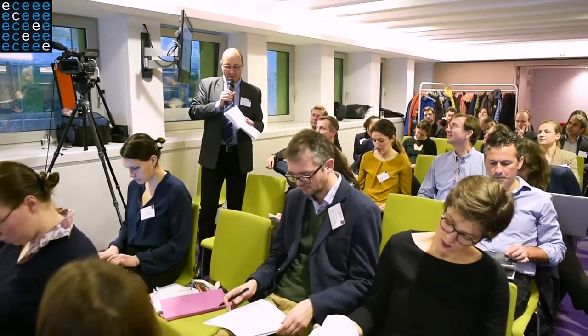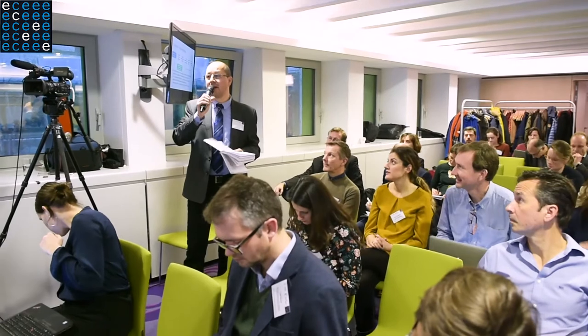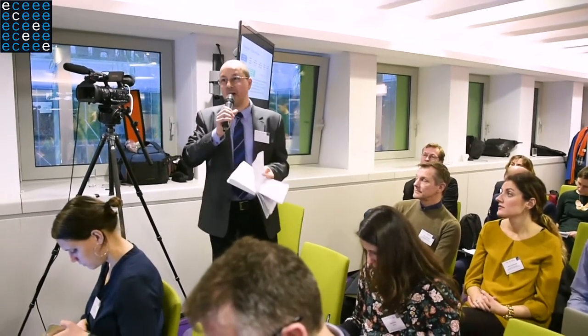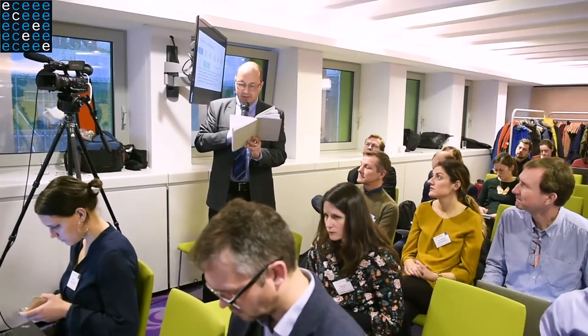Just to say that, yeah, we do scheduling, we do try to keep things under control. Some of them are out of our reach. Some of them are lessons learned already, and in the past were sort of out of our reach, now are within the reach, I would say. An important point regarding the input: the availability and quality of data is essential in the studies. And it varies. In one of the studies that were on my files, there was so much availability from the industry to give us data again and again. At some point, I needed to draw the line and set a cutoff date, because otherwise we don't end the study. We keep collecting data.